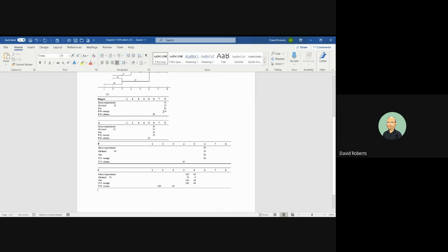The lot sizing in this particular case is lot for lot. And so if you need 30, you're going to order 30. And the lead time again is 2. So you're going to back this up by the 2 weeks from here to here. And so it matches the time-phased product structure tree up above.